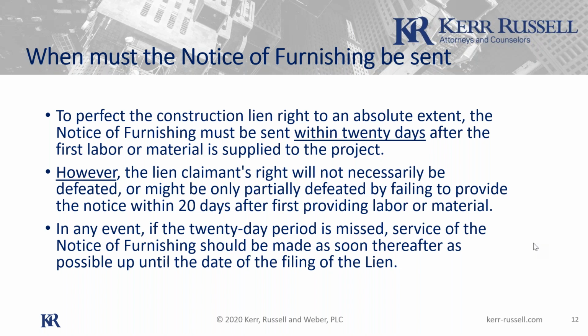Why I say that would be perfect is a lot of times with some members of this group, you don't always lien that often. The supply groups have to lien more often, so they usually have accounting wired to do this. But I've run into situations with many a contractor before, including some of you electrical subs who don't have to lien very often, so they usually are calling me or their attorney at that juncture, and they haven't done the notice of furnishing. What I would say is, no matter when it comes to light that you haven't yet given a notice of furnishing, just do it then. It's better late than never.